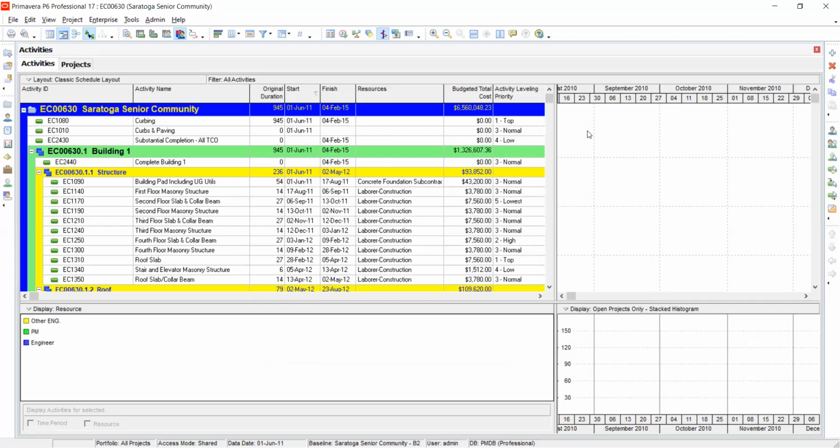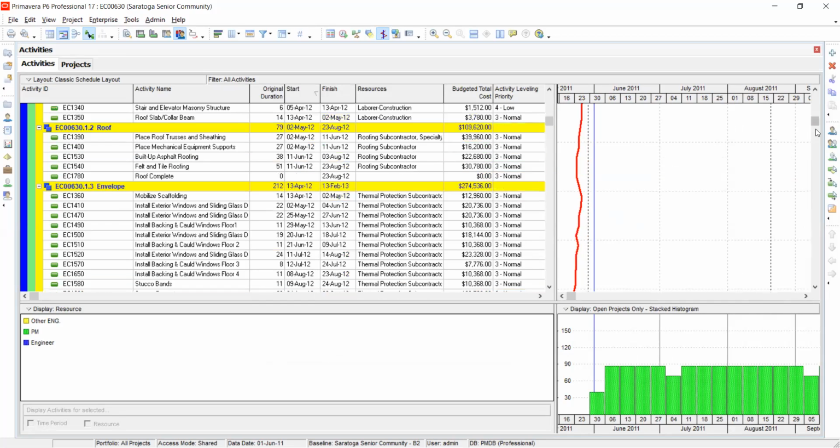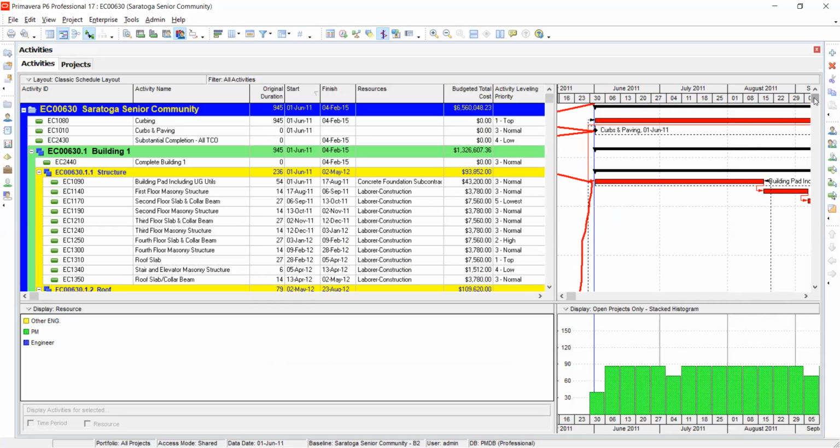You've seen it was 920, now it is 945. So with that, we've seen the number, but it means that some activities have got more days. And why? Because some of the resources were shifted from them to other activities, so that they can have a break or something like that, so that they don't run two activities concurrently.